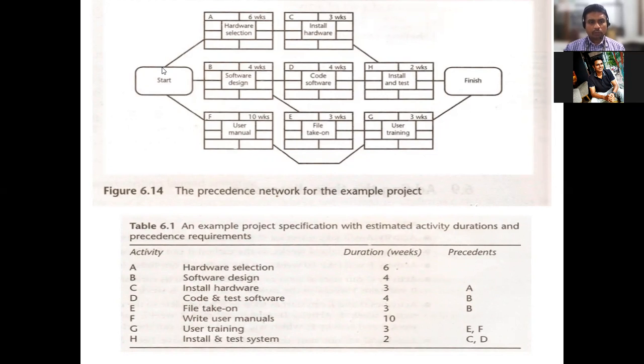So we have two labels for each and every project which you are going to plan for. One is the start and the second one is the finish, followed by which we need to specify the activities that are part of that particular project you are trying to undertake. And each activity, with the labeling conventions, we need to project out the information, starting with the A, the duration and the description. In that way, we can frame this networking framework structure, based on the constraints given in your activity planning, which has already been given in a table format.